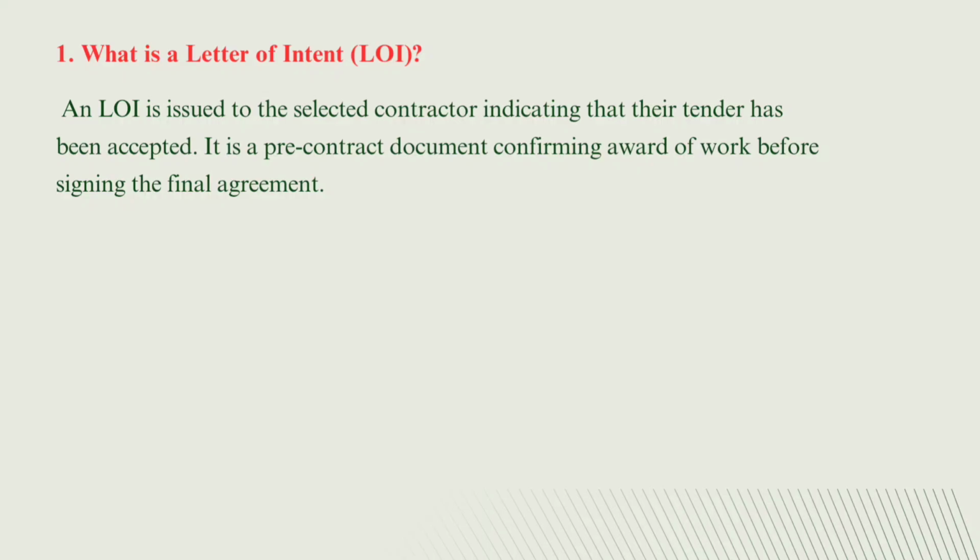Question number 1, what is a letter of intent, that is LOI? LOI, that is letter of intent, is issued to the selected contractor indicating that the tender has been accepted. It is a pre-contract document confirming award of work before signing the final agreement.